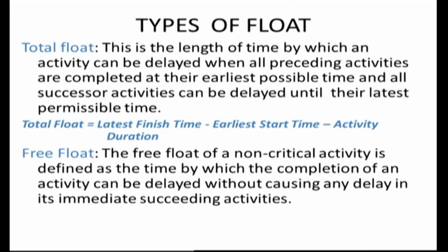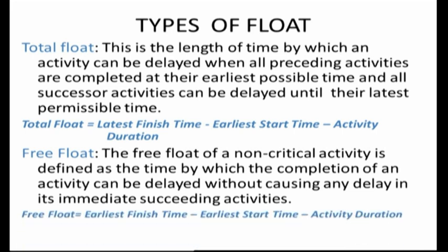Next we have free float. The free float of a non-critical activity is defined as the time by which the completion of an activity can be delayed without causing any delay in its immediate succeeding activities. Mathematically, it can be given as the earliest finish time minus earliest start time minus activity duration. We can calculate total float and free float for each non-critical activity.